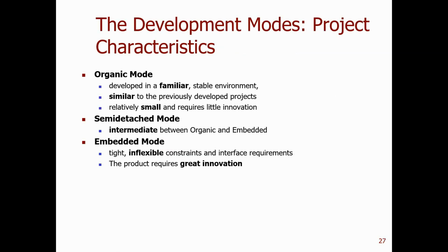And then for each model, there are different project characteristics, so here we have 3 levels. One is organic, a simple small project. The embedded mode is where the project is tight and inflexible in time and needs a great deal of innovation.